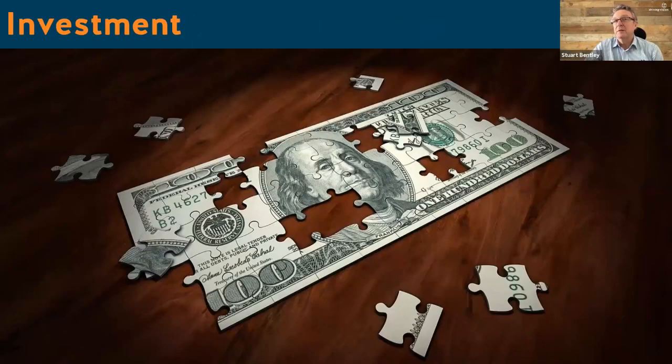Investment in constructed facility represents a cost in the short term that returns benefits only over the long-term use of the facility. Thus, costs occur earlier than benefits, and owners of facilities must obtain the capital resources to finance the cost of the construction. A project cannot proceed without adequate financing, and the cost of providing the adequate financing can be quite large.